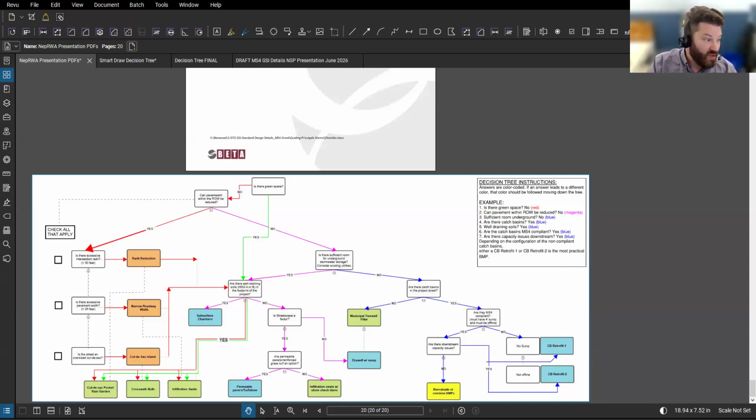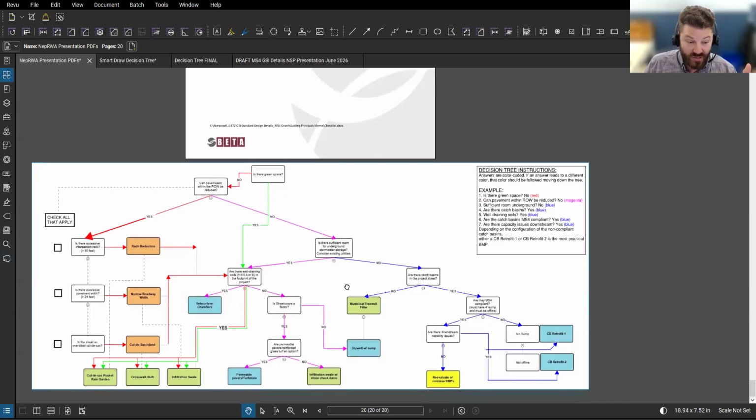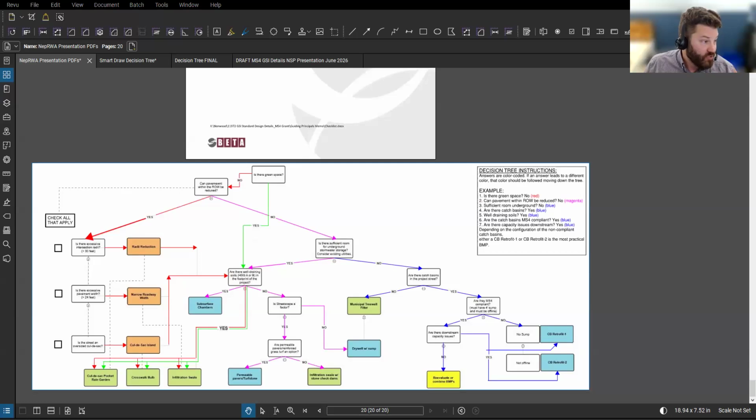Can we, if there are interns or whatever working at the town, hand them this and say, hey, we're paving Granite Street in the summer, go find out everything on this, and here's everything. Trying to get ahead of it is important because with municipalities, timing is everything. Things have to be on the budget well in advance, and they don't like surprises. So integrating this early is, to me, key.